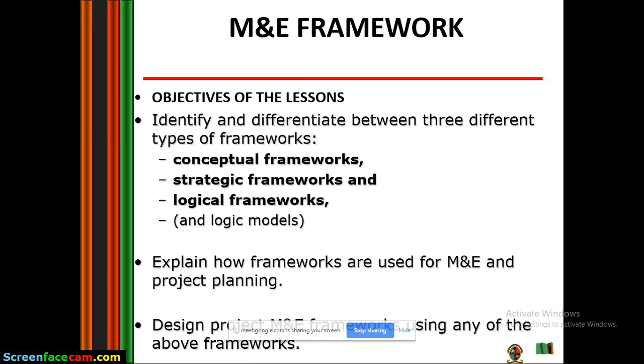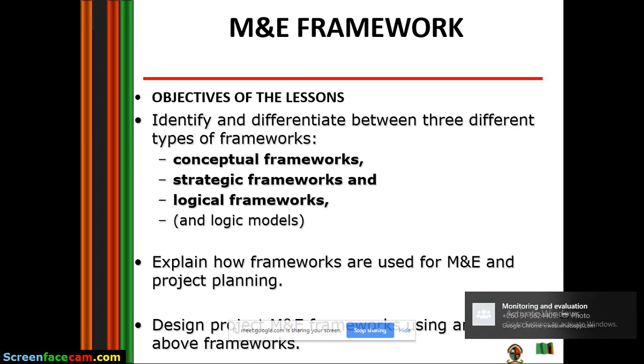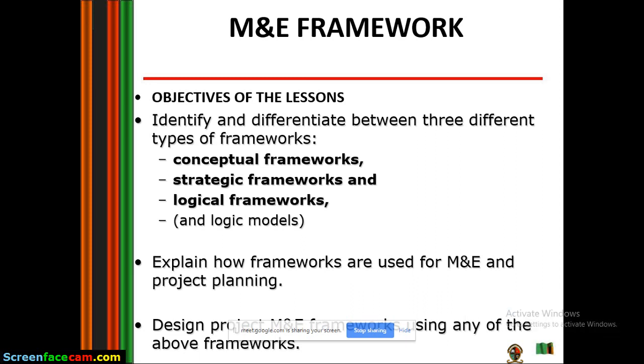standard or comparison. So in whatever we've done thus far, evaluation will come in to assess what we've done, then do a comparison to what we had put in plan. For instance, we could have put that we want to reduce HIV prevalence to 14% after 10 years. But along the process, we are going to put in indicators. Say HIV prevalence from 14.2 in the first year should reduce to 10%. Those would be our indicators.